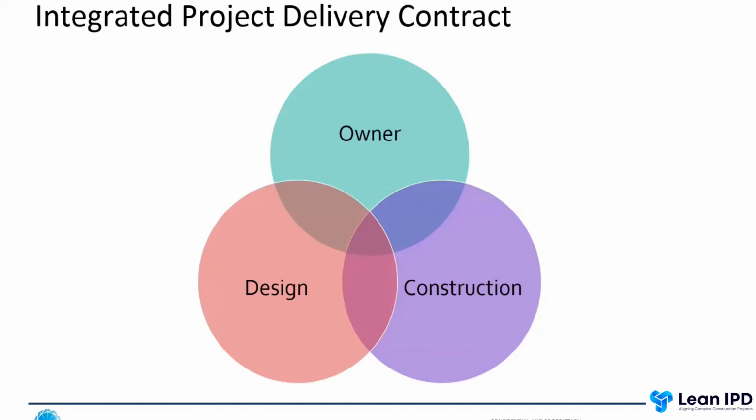It's compared to our more traditional model where the owner would contract for design separately from construction and then kind of be in the middle trying to facilitate the information and the conflict going back and forth. Here it's an integrated contract. And then underneath the main builder and designer, we will bring in sub-designers and trade partners into the business deal where they'll have their profit at risk.